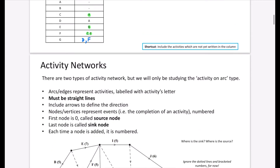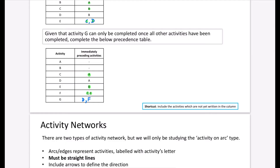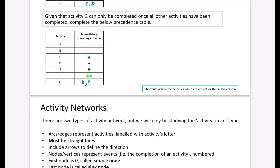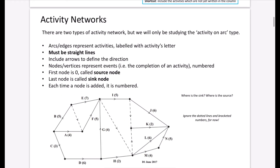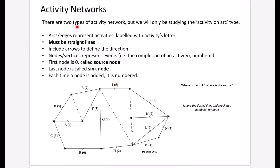Now we'll look at activity networks — a way of taking a precedence table and representing it visually. There are two types of activity network, but we only study the activity on arc type, where the arcs or edges represent the activity and are labeled with the activity's letter. In this example, each arc represents an activity: A, B, C, and so on.